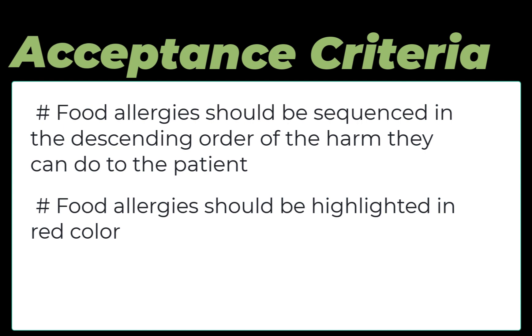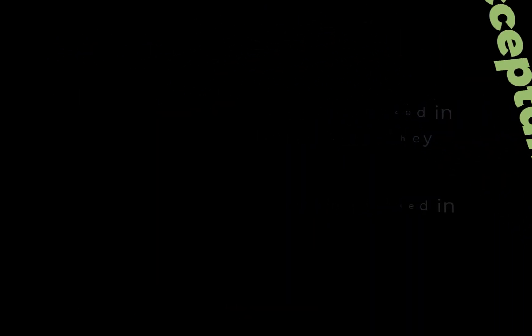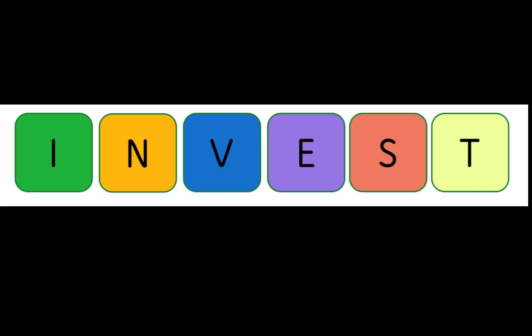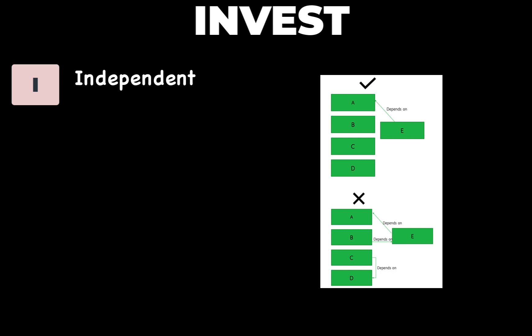Let's discuss another effective method which can be used to write good user stories. This method is represented by INVEST, where I stands for independent. Try to write stories which are independent of each other — one story should not have a dependency on other stories, and whenever required, can be pulled from the backlog and worked upon. There are times when it is not possible to have a story completely independent, which is okay, but the idea here is to minimize the dependencies.